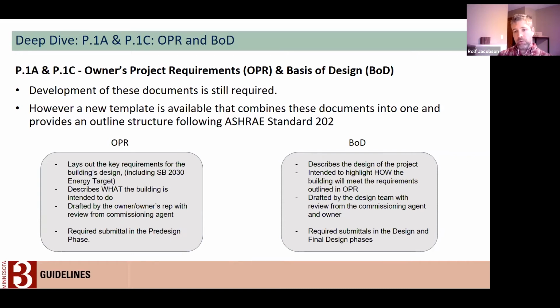Then the BOD comes in after that, in the design and final design phases, and it's a design team response. It describes the design of the project and how that project will, in fact, meet the requirements laid out in the OPR. In summary, there is a new template that provides a structure for drafting these two.